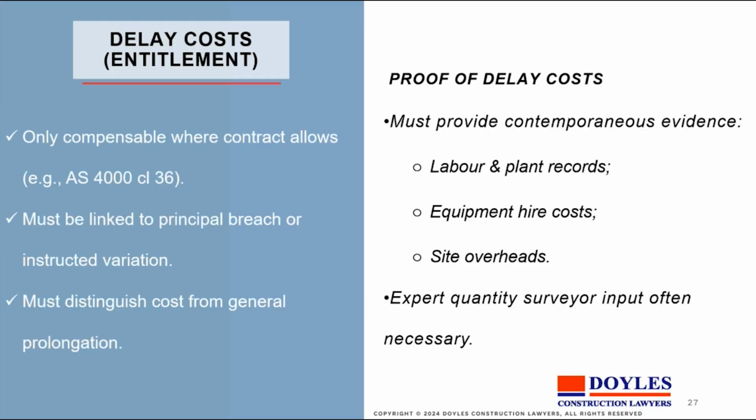The other aspect with equipment hire is that the length of hire varies the amount substantially. So if you're going to acquire a rock breaker of a certain sort of weight and power, then if you hire it for a day, it'll cost you perhaps, say, $5,000 a day. But if you hired it for the whole week, it would perhaps cost you only $15,000. That is, you get a substantial 40% discount. And if you hired it for 3 months, you might get it for a lower cost still.